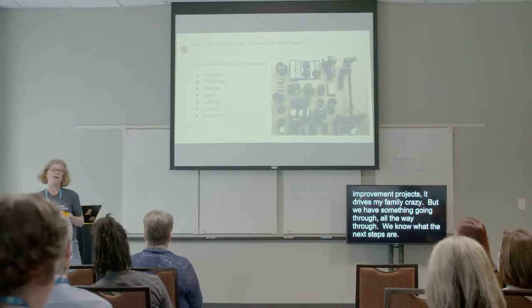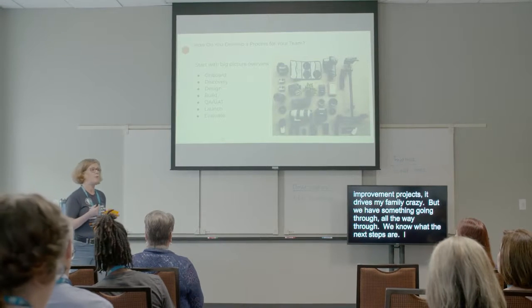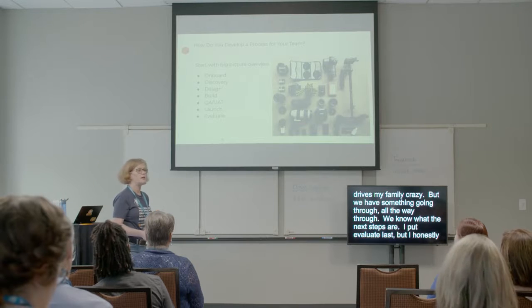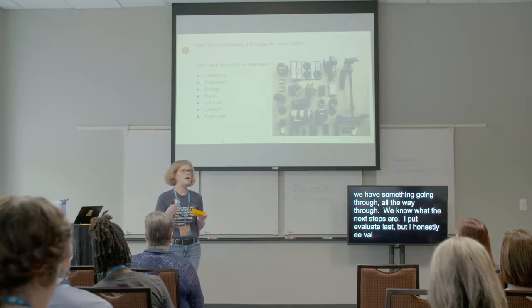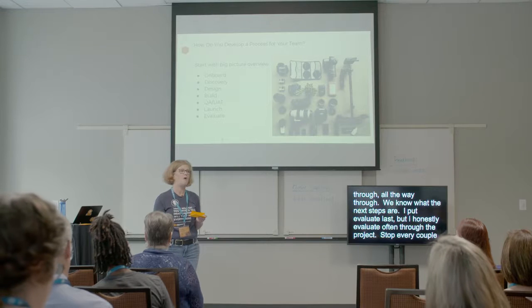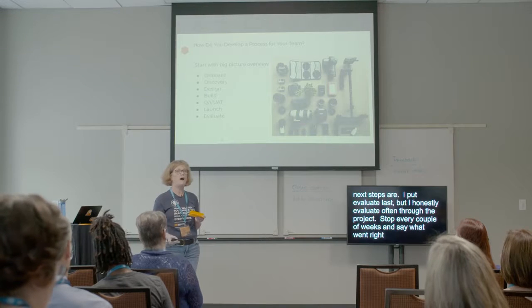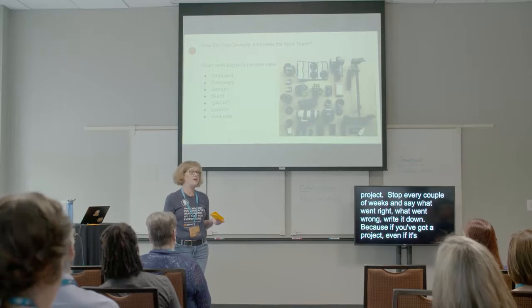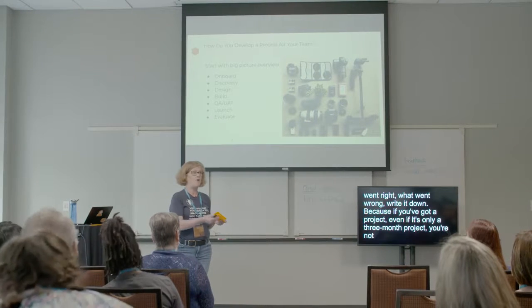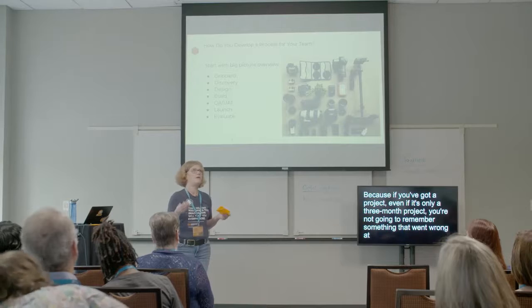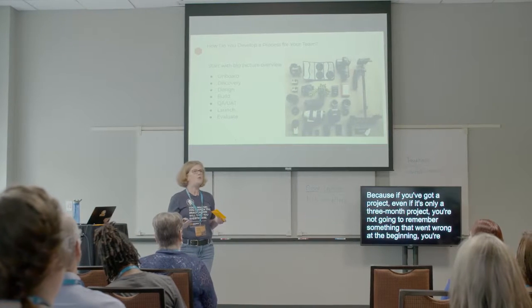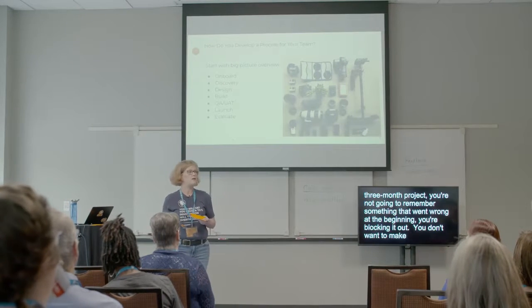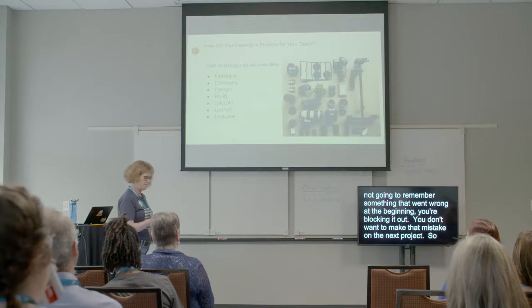I put evaluate last, but I honestly evaluate often through the project. Stop every couple of weeks and say what went right, what went wrong. Write it down. Because if you've got a project, even if it's only a three month project, you're not going to remember something that went wrong at the beginning. You're blocking it out. You don't want to make that mistake on the next project. So write it down as you go along.